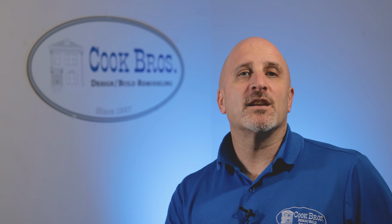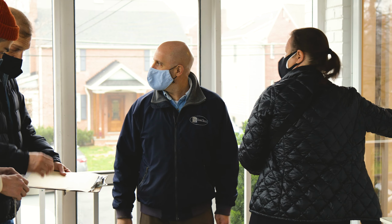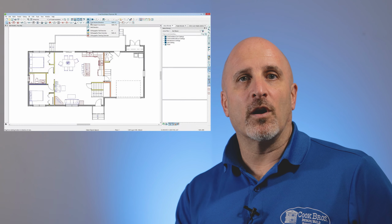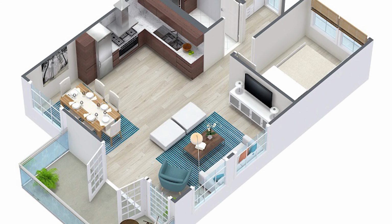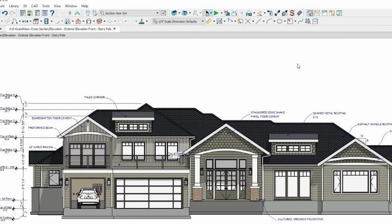Once we've signed that design deposit agreement, we're going to lock in a start date for you so we know what we're working towards on our production schedule, and we're going to set up a measure meeting where we'll come out with our design team to take detailed measurements of the house. The first step is for us to build the house out on our CAD software so we know what we're starting with, and then we'll be able to show you virtual models of exactly what we're proposing to do. We can show you layouts, roof lines, window layouts, everything that'll help you decide what's right for you.